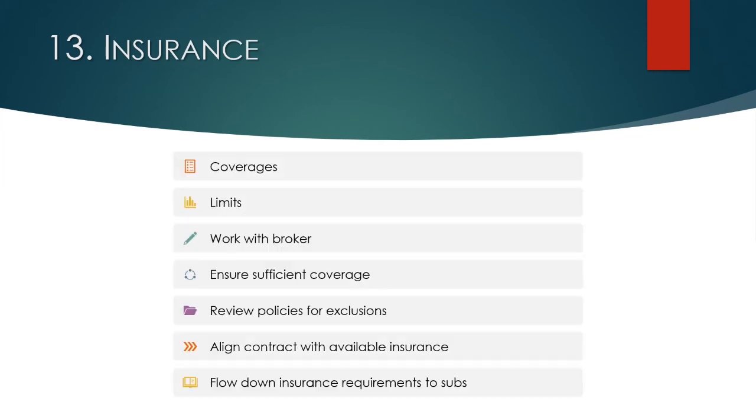I'll go back to that slide, please. You also want to make sure that you're working with your agent to ensure that the work that you're actually doing is not excluded by the policies. I know that sounds weird, but I know of examples where a stucco subcontractor is doing work on a multifamily project, and lo and behold, their policy excludes coverage for stucco work on multifamily projects. And believe it or not, there was a stucco problem and there was no coverage. So be aware of those things.